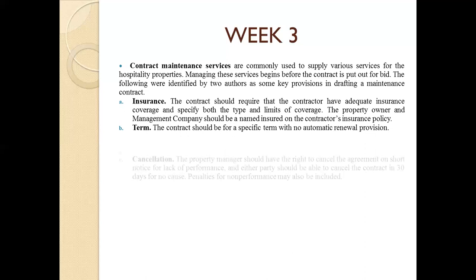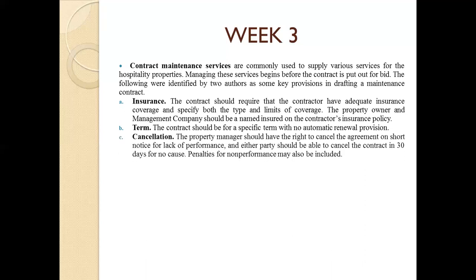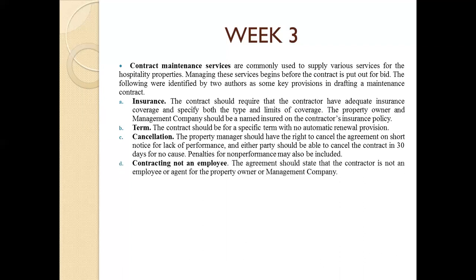Okay? Cancellation. The property manager should have the right to cancel the agreement on short notice for lack of performance. Okay? Kung nakita ng manager na hindi sila ganun kagaling sa performance, at the same time, hindi sila competent, they can cancel the contract. Contractor, not an employee. Okay? The agreement should state that the contractor is not an employee or agent of the property owner or the management company. So, hindi pwedeng empleyado.